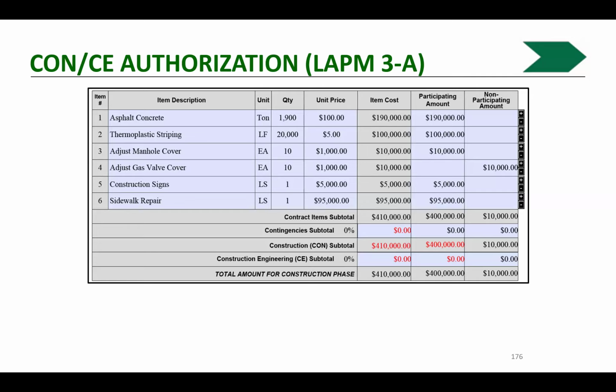If you have construction engineering planned within your construction here, you can start billing for that construction engineering as soon as you have your authorization back. So the time you're spending to deal with the advertising and reviewing the bids or doing all that, you can do a billing and meet that 6-month invoice deadline that starts as soon as you're authorized.